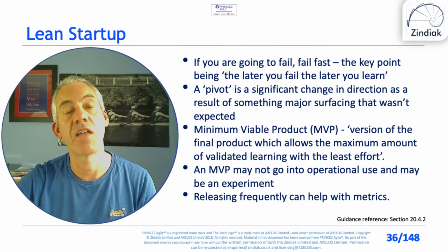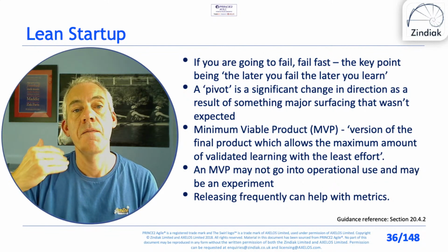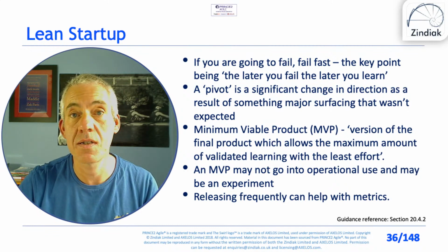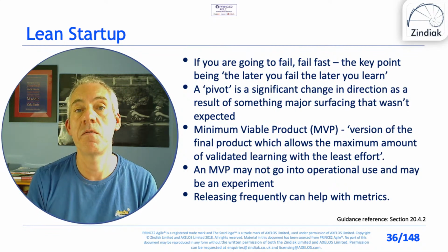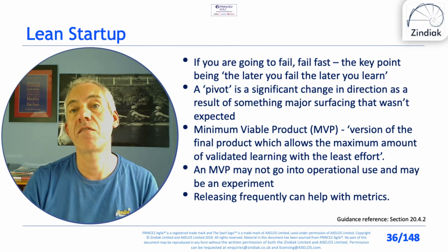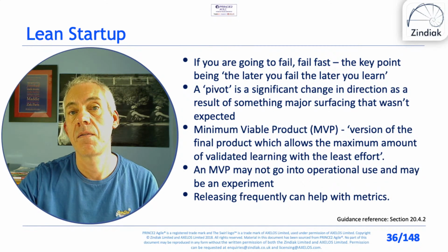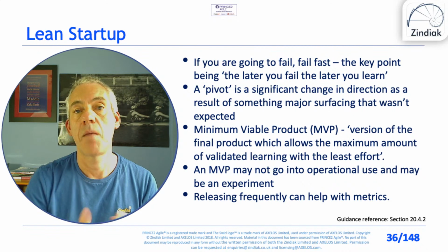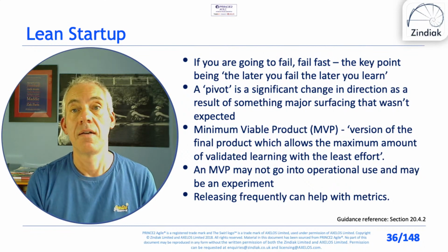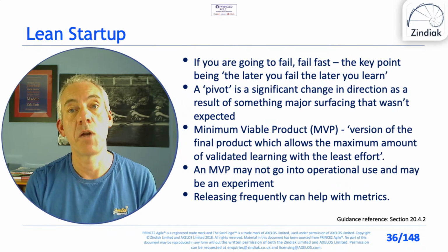And that's an important point about the minimum viable product. At that point in time, the minimum viable product for me is a sketch on a whiteboard. Once I've got agreement for that, then I go away and produce a prototype in code, which I can do much more easily now than I could in the past, a little bit like building with Lego bricks.